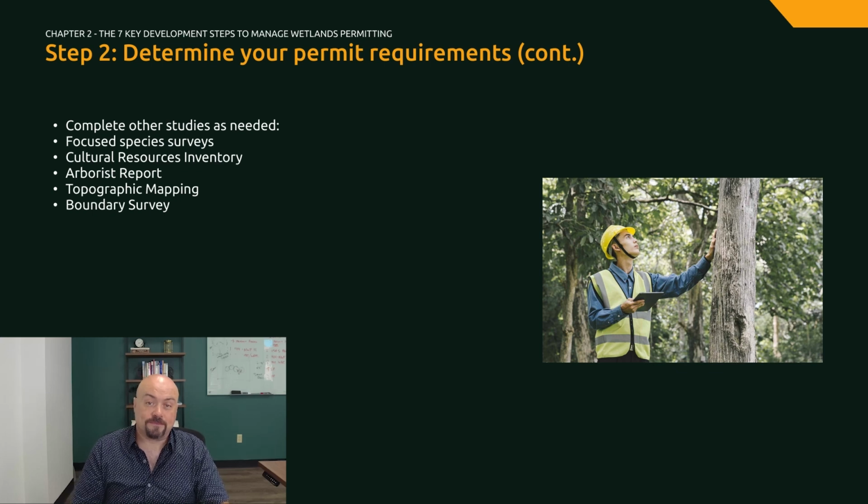You may also need a topographic map of your property to prepare improvement plans for new buildings or roads, but this information is also very useful for identifying existing conditions such as slopes and drainage patterns, and either proving or disproving hydrologic connectivity between surface water bodies, therefore identifying wetlands.